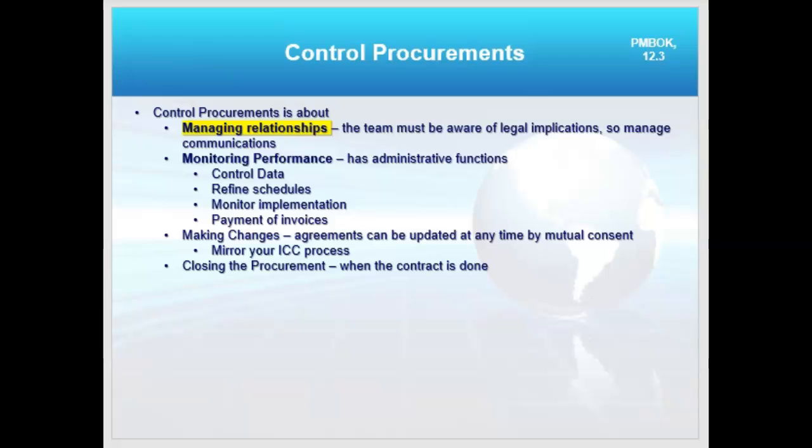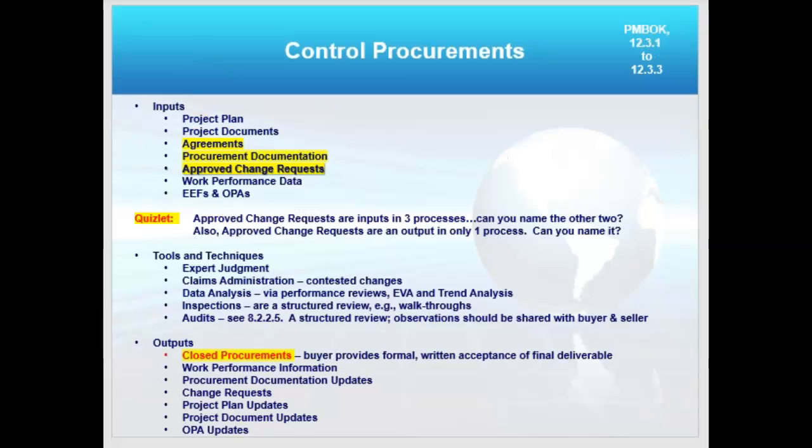Now, change management should be intentionally written into the contract as the project manager. This is something I want to emphasize with my procurement manager, because I've built a very robust integrated change control system for my project. That's how I'm managing changes on this predictive or waterfall project. So I want to make sure my procurement ties into that process. So I have my inputs, tools and techniques, and outputs.